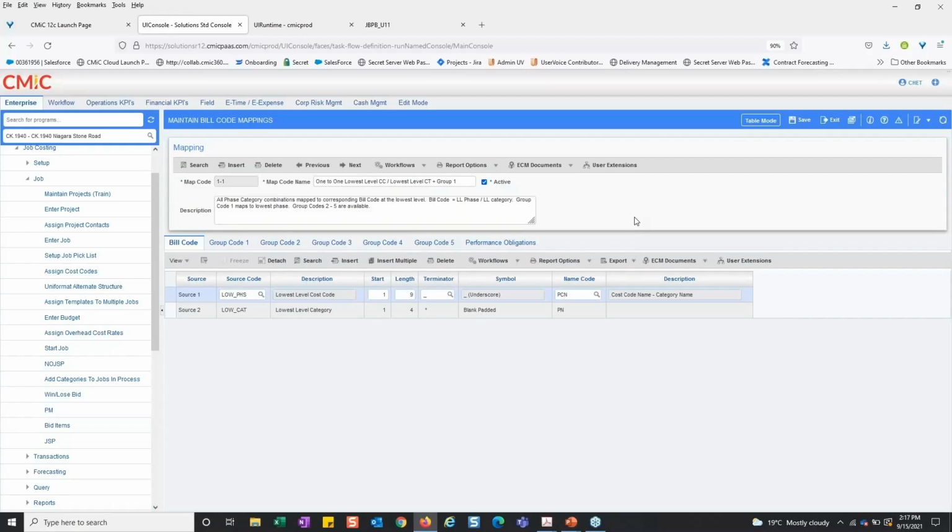You'll usually do it to a code like 03110 or some sort of very specific numeric code that we're going to capture the cost. And effectively, in that example where I have 03 and then 03110, that cost code 03110 is the lowest cost code.